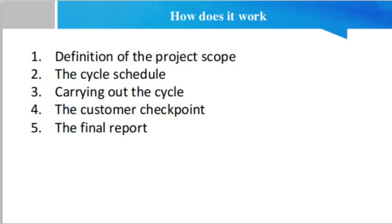Finally, you must produce three documents: the list of functional requirements that prioritizes the actions to be carried out (this list may change as the project progresses); the project Work Breakdown Structure, which breaks down the work to be done to achieve the project objectives; and the scope triangle, which shows how the different constraints of the project - namely time, project cost, and scope - influence the quality of the project.